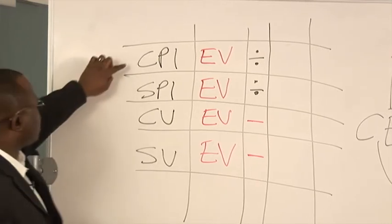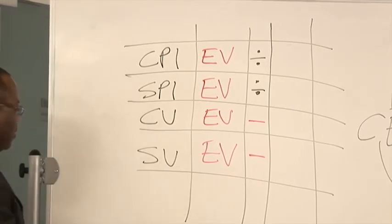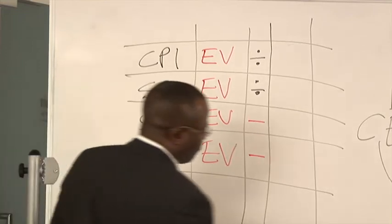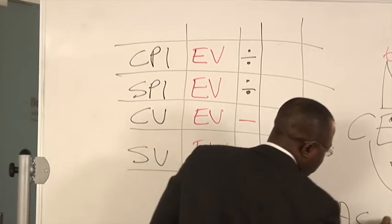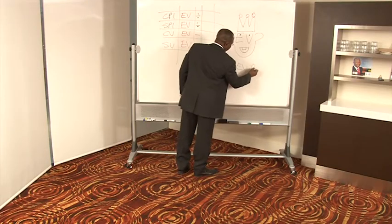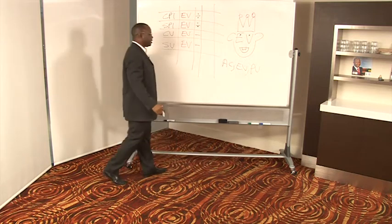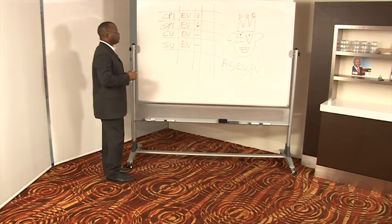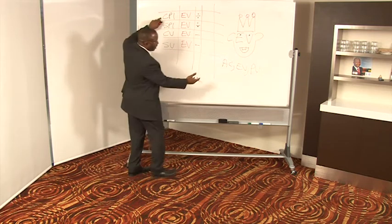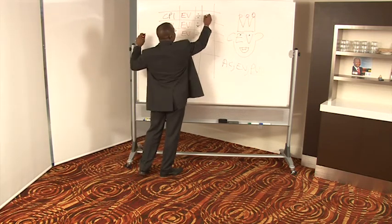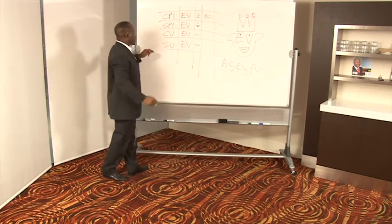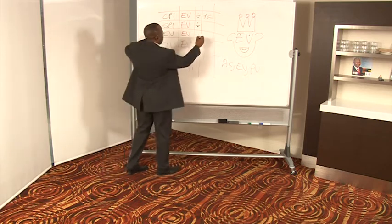If we're talking about cost, remember we've got these three basic metrics: AC, EV, and PV. Basic metrics in EV. If we're talking about cost, we're gonna take the actual cost and put that in here. Talking about cost, actual cost.